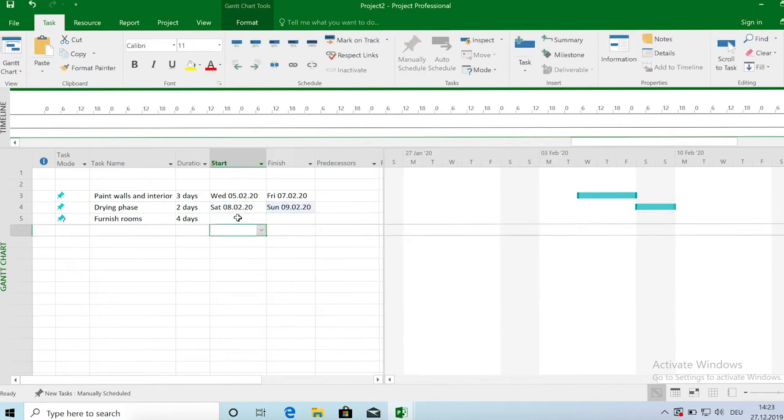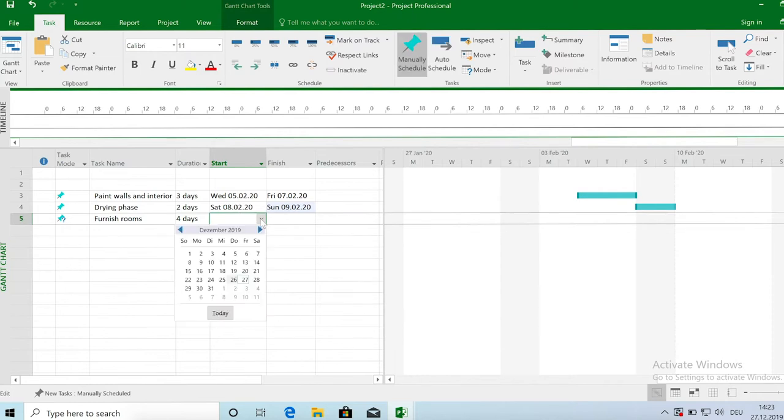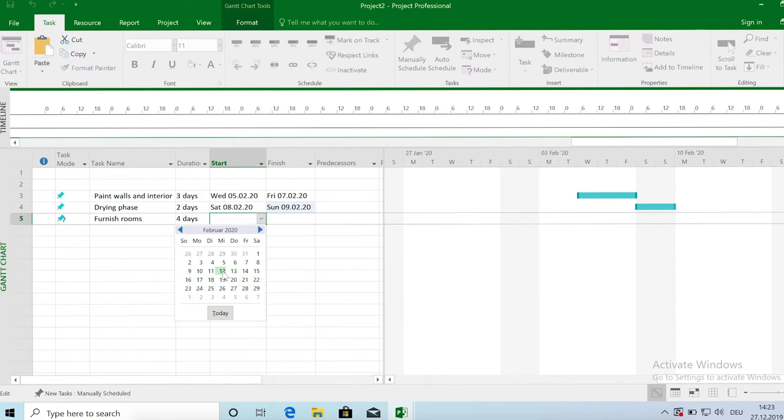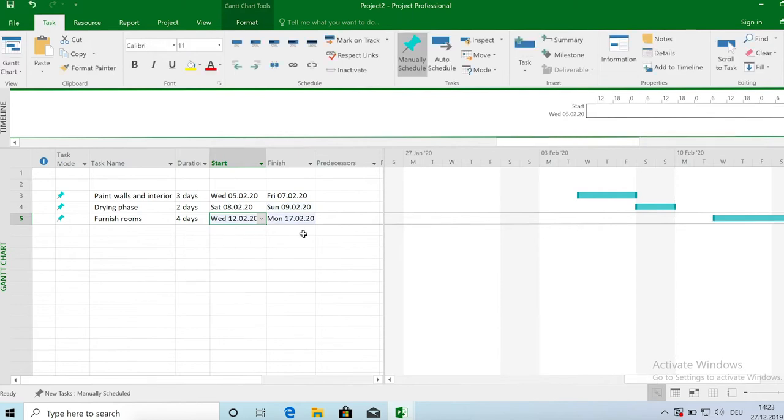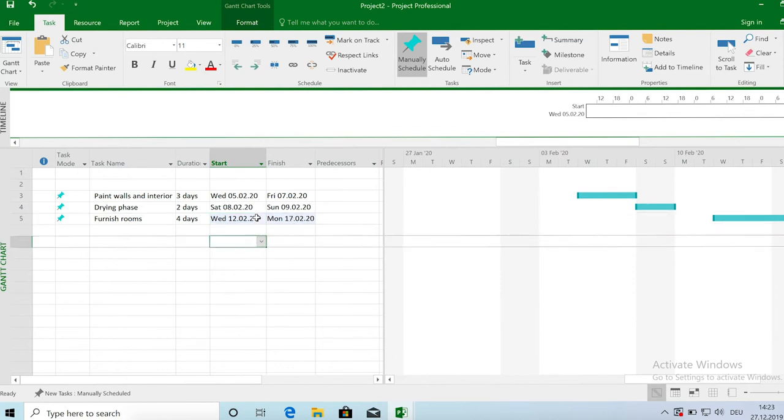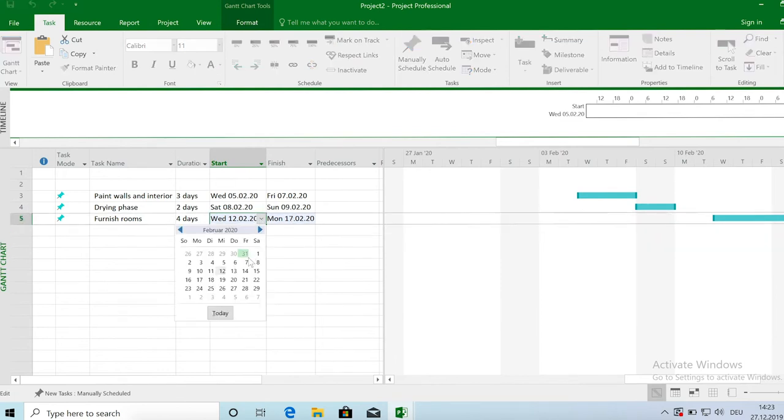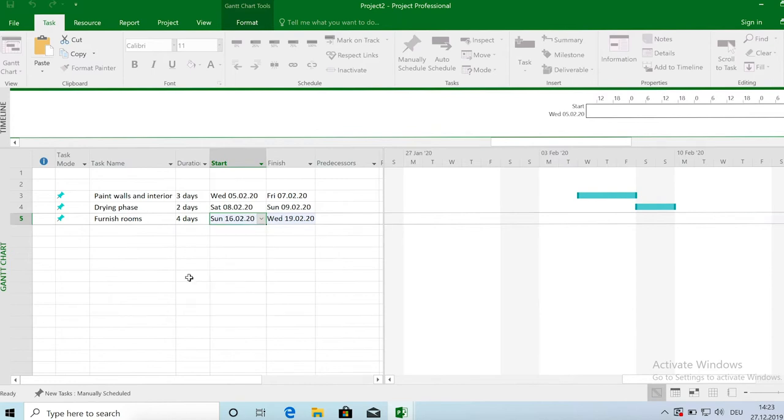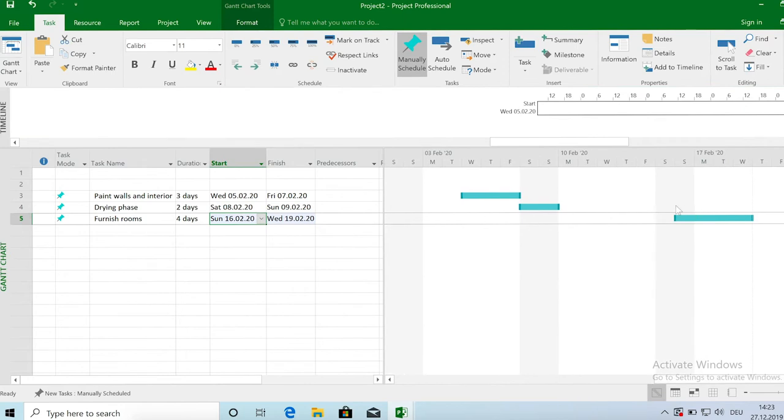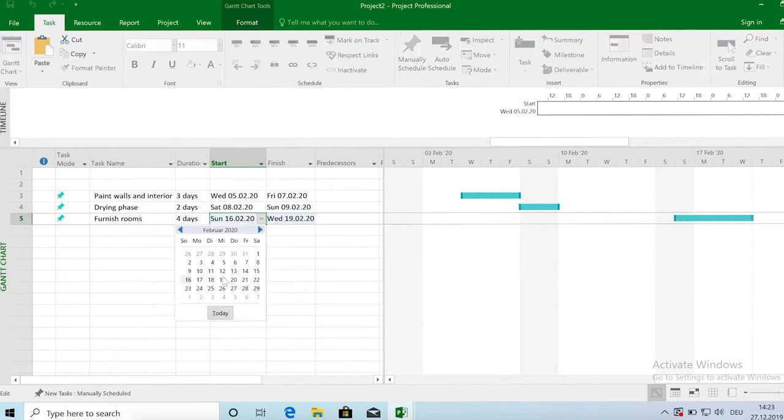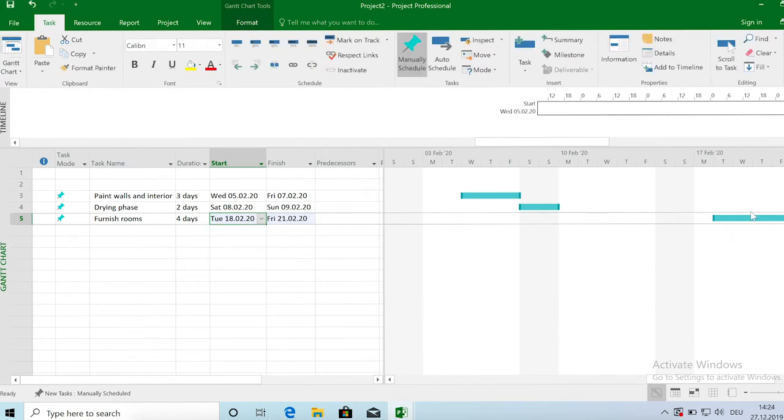So let's say we start with the furniture on Wednesday the 12th and it takes us 4 days. So there's a weekend in between. We won't work on Saturday and Sunday. So we will finish this 4 day task on Monday the 17th. So you can see I can arrange or set the start date to whatever date I feel comfortable. I can leave out a week. There's no problem. You will see it just changes here the Gantt chart. So this gap becomes larger as we move away the furnishing task.